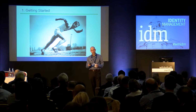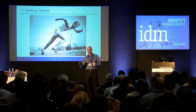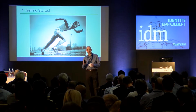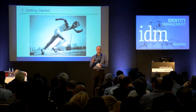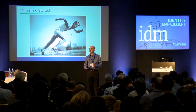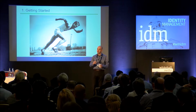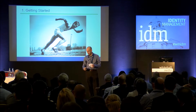Now, how we did this and how Agile helped us do that is we picked a very common standard, Scrum. We're going to go with Scrum. It gives you very short deadlines, weekly iterations, and we just started doing that even without a development team. So we've got the program team, the program managers, the project managers, the architects, the IG people, and we started working in an iterative way around every single aspect. The design, requirements capture, user engagement, all of the things that we needed to do to get the thing moving, we just started. And I think if we hadn't done that, we would never have met our timescales.